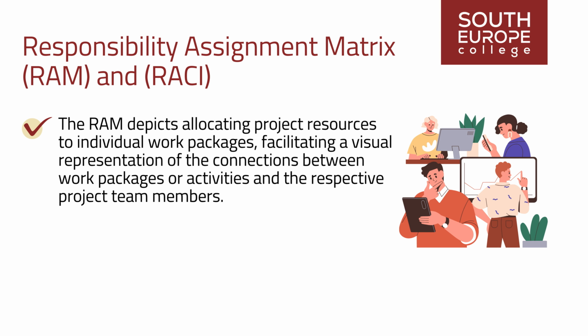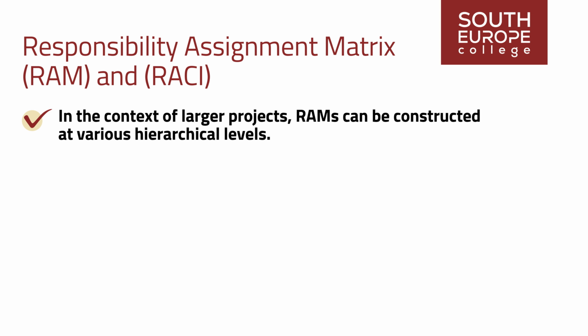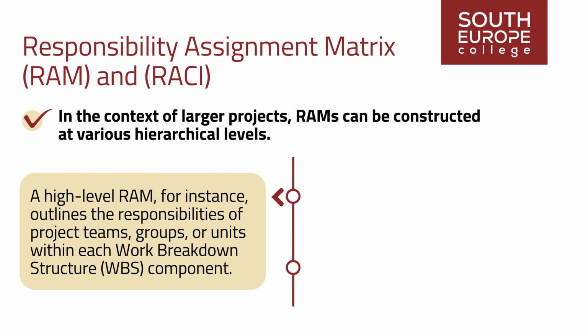The RAM depicts allocating project resources to individual work packages, facilitating a visual representation of the connections between work packages or activities and the respective project team members. In the context of larger projects, RAMs can be constructed at various hierarchical levels. A high-level RAM, for instance, outlines the responsibilities of project teams, groups, or units within each work breakdown structure component.